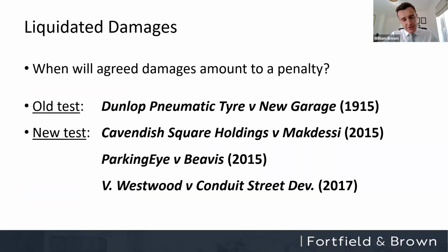So liquidated damages, everybody loves the topic of liquidated damages because, you know, it's quite an obvious thing to understand. If you don't finish the project by a certain date, you owe the employer money, depending on how long after that date you finish. Again, it's a fixed amount of money, but what the law says in this area is actually quite interesting, which bears discussion then.